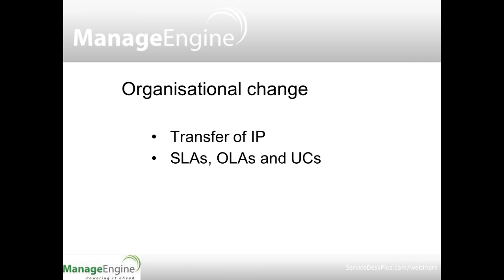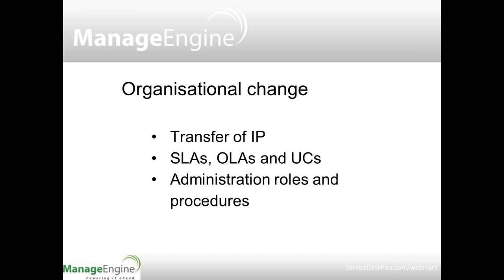And it's not unusual for the underpinning contracts to not match up with the SLA. So we've committed one thing to the customer and we've not asked for that to flow through to their suppliers, which makes it pretty hard to deliver on the SLAs. So being involved in the whole SLA, OLA and underpinning contract process through the design and development of the system is important for operations, and making sure that they match up and meet up.